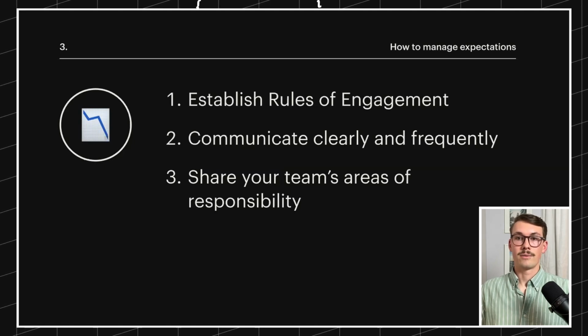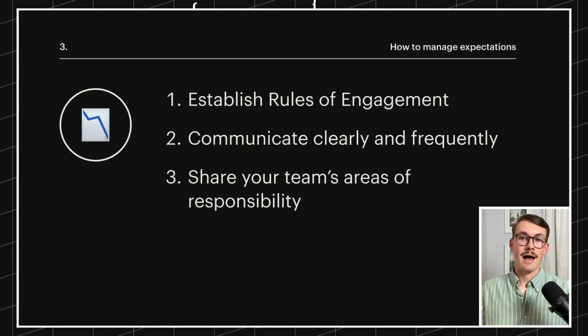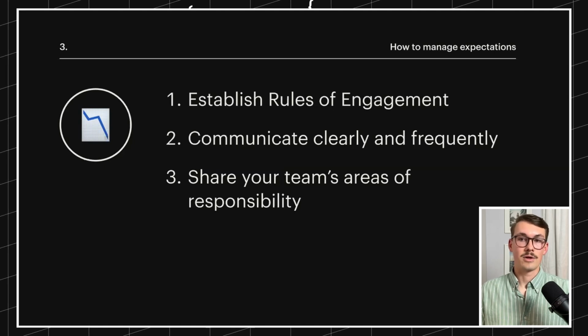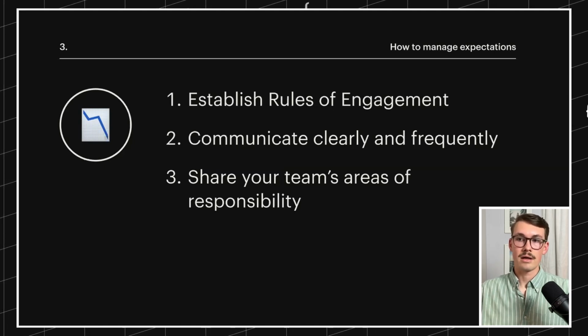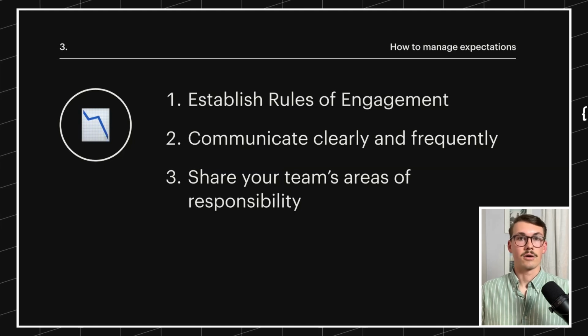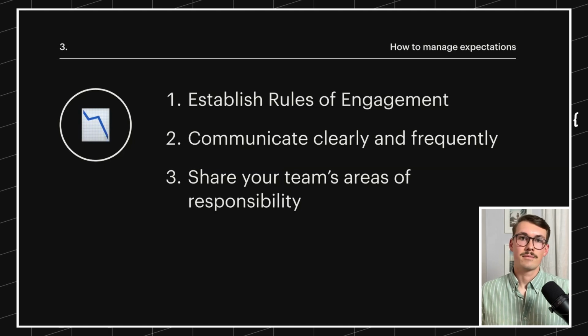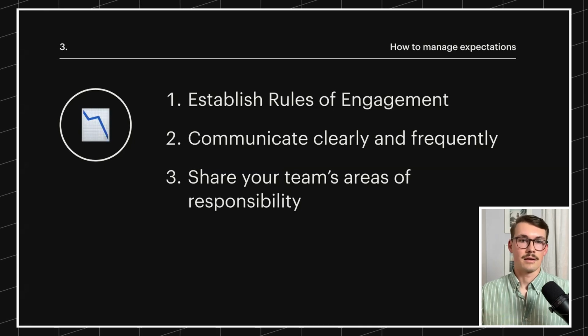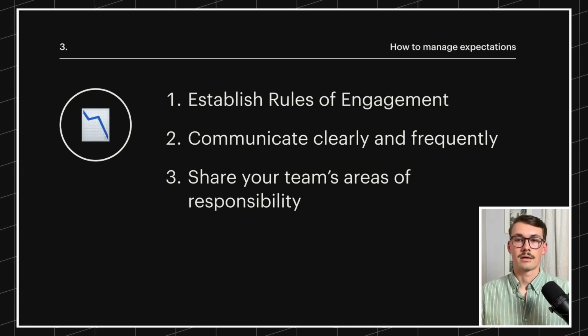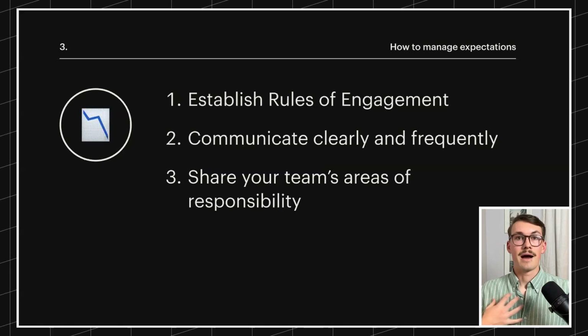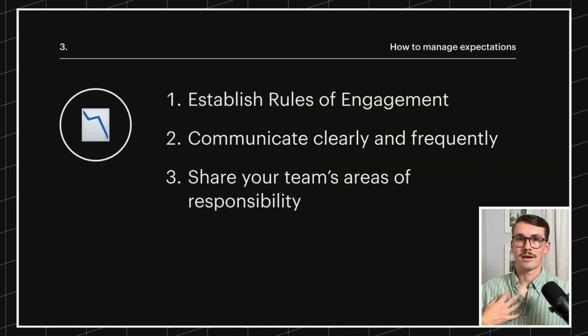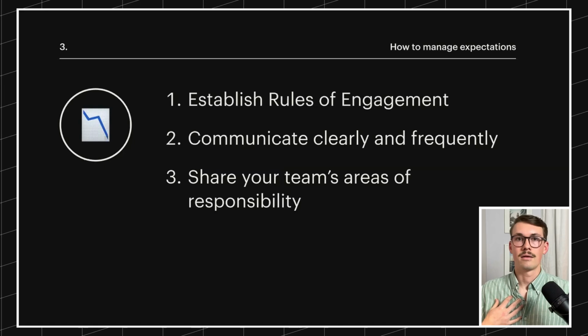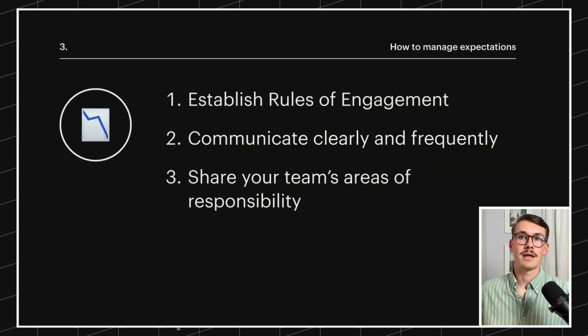One thing that I found out is that higher cadence in communicated updates leads to more clarity and less need for longer meetings. So they initially reached out and they were like, hey, let's have a daily stand-up. It'll be 15 minutes. We're just going to get aligned on the work being done, and then we'll break and complete the work needed for that day. And my initial gut reaction was like, oh man, we're going to have so many meetings.